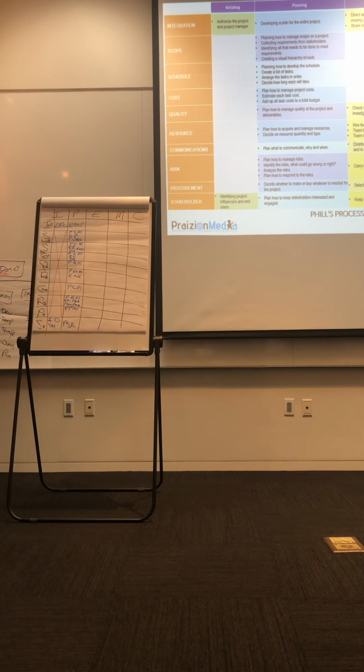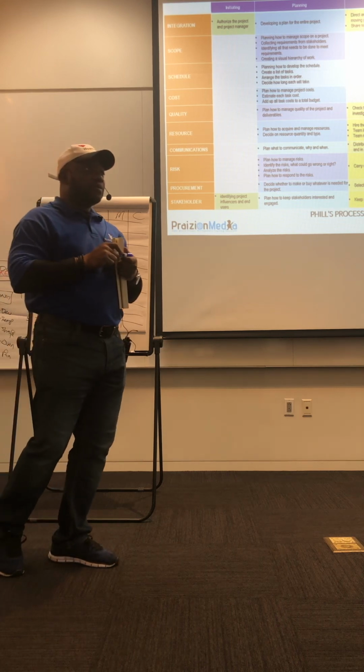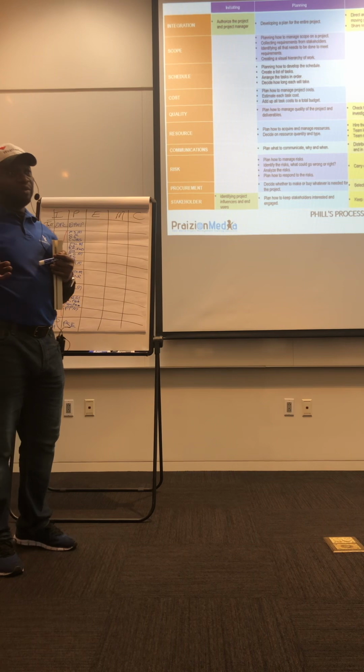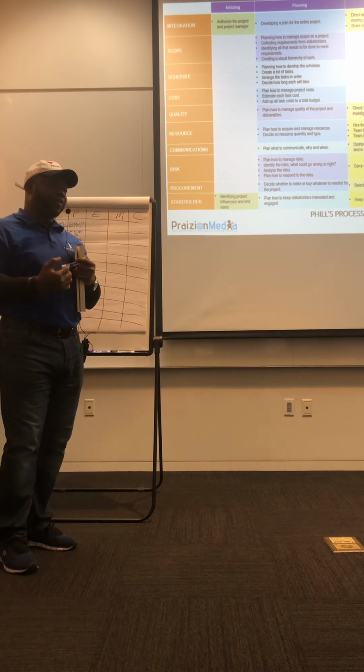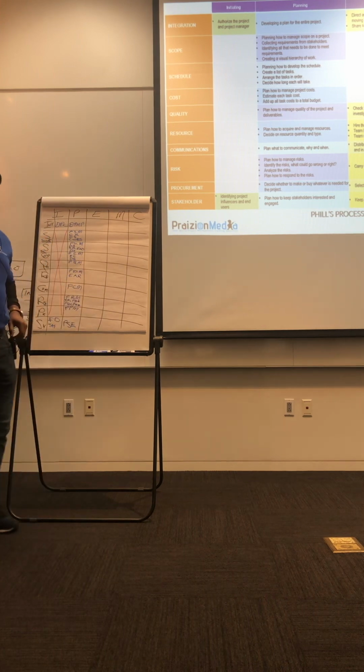Can you not combine quantitative and qualitative risk analysis with that risk registry? Yeah, so to be quite honest, the PMI says quantitative is optional because not everyone cares about the monetary impact of a risk. So you could say, I'm only doing qualitative. To be quite honest, on some projects it's a waste of time. The project is over by the time you're done with the quantitative. You know what I mean?